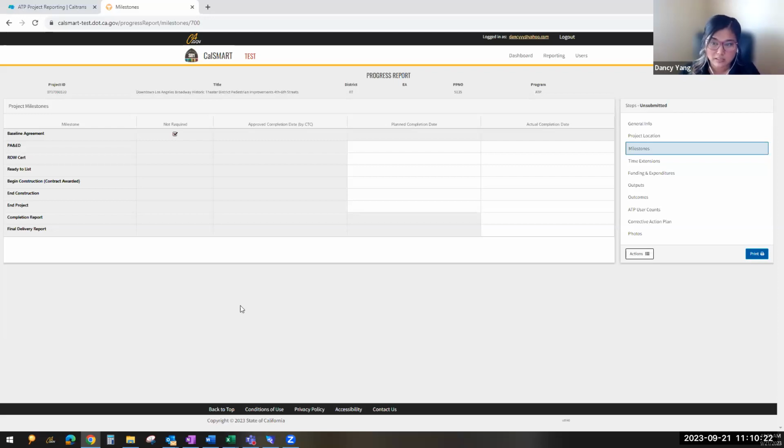That could be what's delaying you from being able to submit the final delivery report. But you don't want to miss that deadline. That is the time frame in which you want to do the after counts, because if you miss that date, then you have to wait a whole other year. Then you would get prompted and reminded to submit your final delivery report every single time.